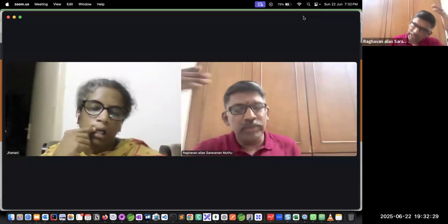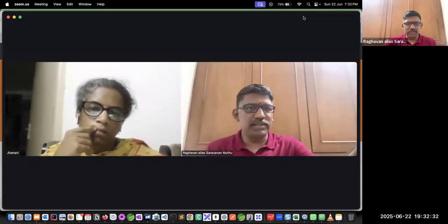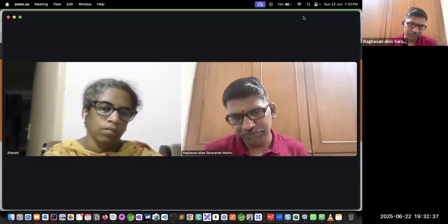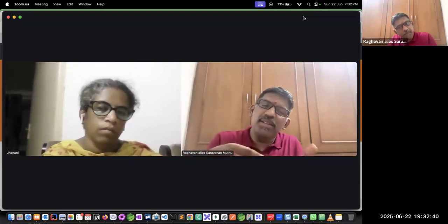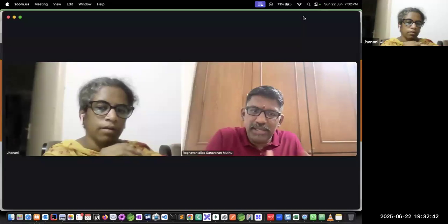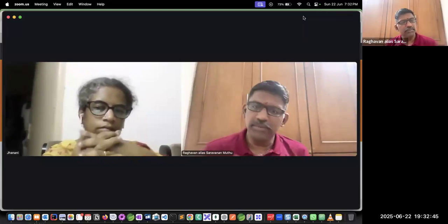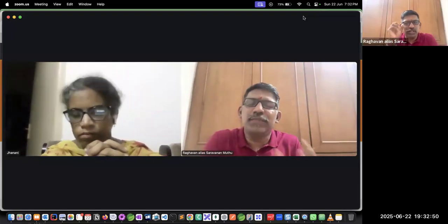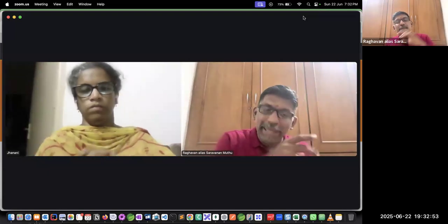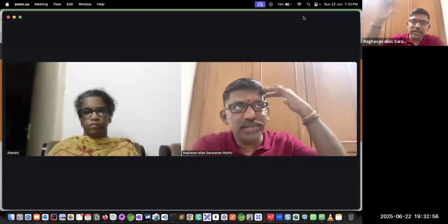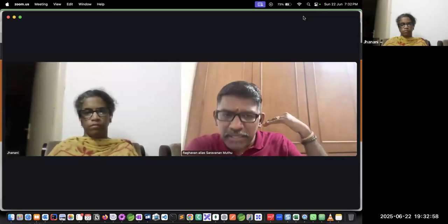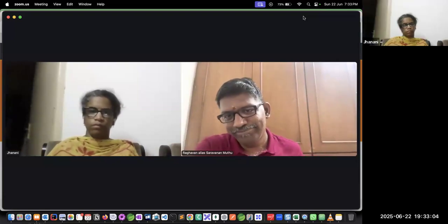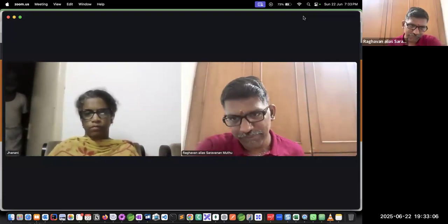If we bring it down, we can say there is a DB task, a UI task, a backend task. We can split it down into tasks. A task can also be subdivided into subtasks. Inside UI itself, one for configuration, one for coding, etc. Eventually, next week, we keep this ready, at least for one sprint, and then take a look so that we can revise what is already captured in it. It will be an easy input for us to start logging the stories under Confluence. Writing stories will be helpful for us.